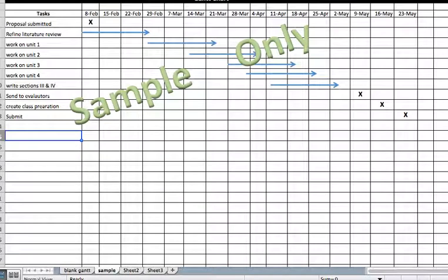And the way that this works is you put in your time slots here. So you're going to put in for the 10 weeks. And then you're going to break down your project, whichever one of the 5 that you choose. Break it down into what I call bite-sized chunks. So here's one for a creative project, the one on my thematic units. And then what you do is, if it's something that's due in 1 week, you can put an X. You can put arrows to show that's going to go over a couple of weeks.